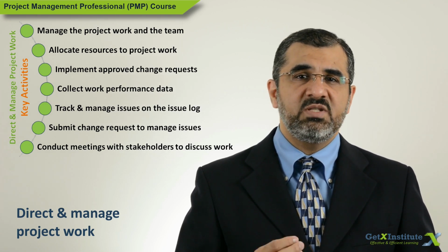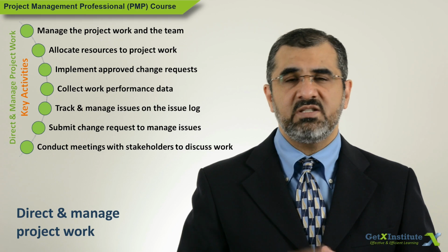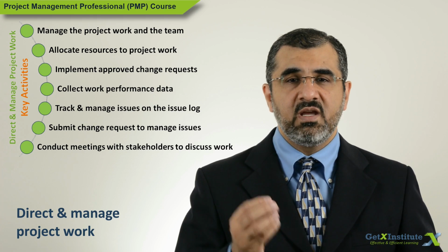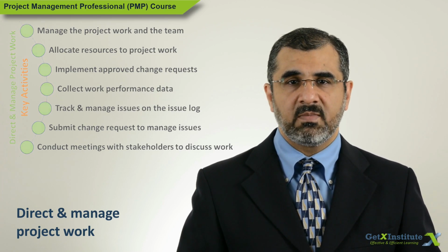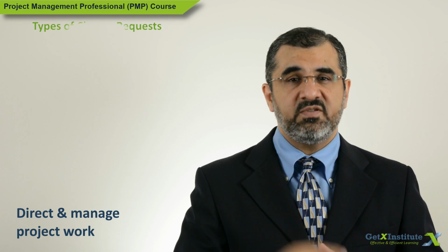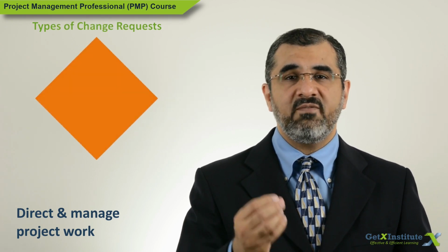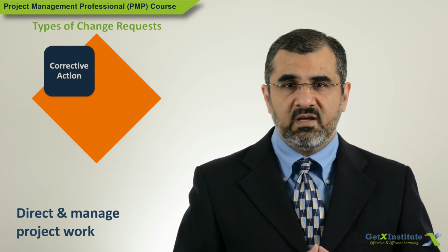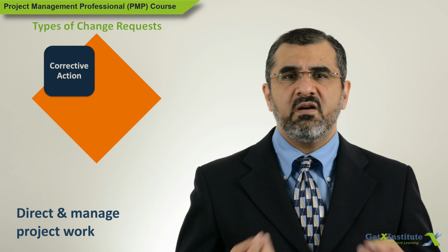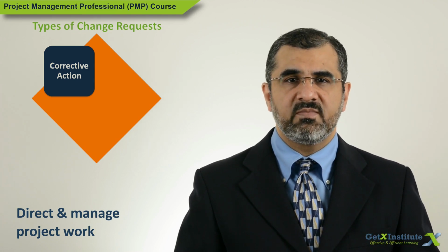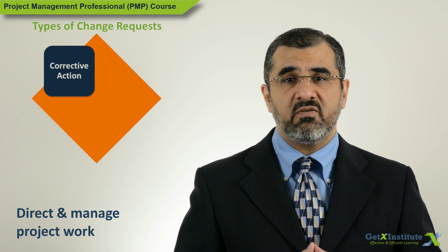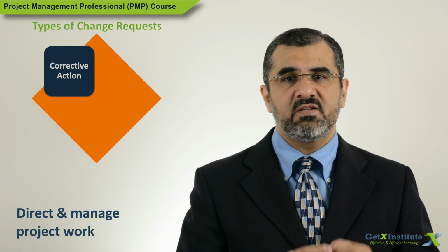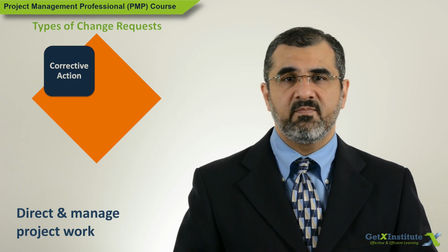I have mentioned the term change request a few times. A change request is a request to modify one or more components of the project management plan. There are 4 types of change requests. Corrective action change request. When a process is broken or defective, it must be fixed, otherwise it will continue to give erroneous output. In this case, a corrective action change request is put up to fix the process. It corrects the process so that the issue never occurs again.